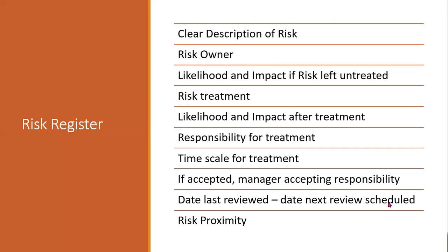Remember, we said that if a risk is identified, even if the risk has been accepted, it still needs to be retained in the risk register, and it also needs to be reviewed constantly, because the likelihood may change or the potential impact may change. And that's why we monitor and review our risk register.